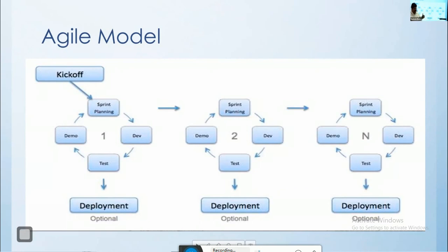Second sprint, another 4 requirements, together 8. Next sprint, another 4 requirements, together 12. Supposing by the end of the 5th sprint or 10th sprint, there are about 40 requirements ready. System is in a usable condition. Now we make it live for the business. Then slowly we keep on adding requirements after going live. Very beginning builds are not deployable. If you get some minimal functionalities to run a business, that project will be deployed for the business. Take this diagram down.